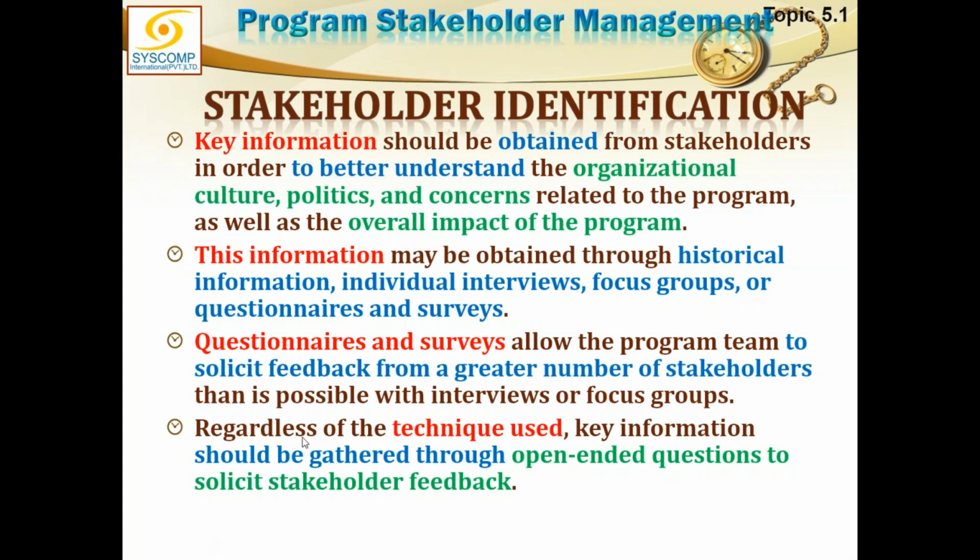Regardless of the technique used, key information should be gathered through open-ended questions to solicit stakeholder input. If you're asking yes or no questions, these are not open-ended questions.